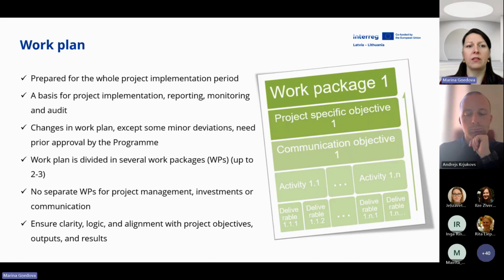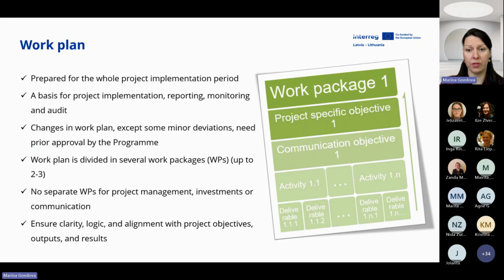So please be informed that the work plan will be prepared for the whole project implementation period. That's why please be precise, and plan activities, deliverables, and objectives correctly. The work plan is used for assessment, and from the work plan, assessors can understand what will be done in the project, the logic, the activities, and partners involved. Changes in the work plan are possible during project implementation, but it shall go according to procedure. Some small changes are possible without changes in the application form, but these are minor deviations.